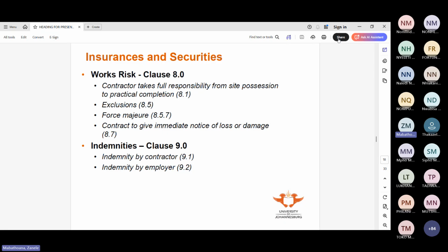Generally, a side instruction is, for instance, we've given a design. I'll use an example of one of the buildings we're doing in Pretoria. We had put the generator in the basement, but there was a mini sub right there. And the city said, you're not going to get an occupation certificate with this. This is a fire hazard. You can't have a generator and a mini sub next to each other.